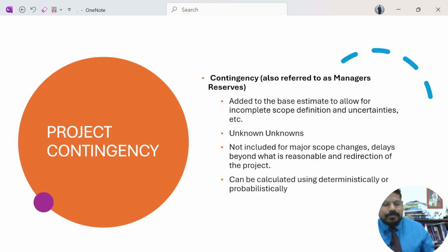Which means what this person is going to do is make the budget out of 80 minus 10, which is 70. So person A, as a project manager, will plan all the project things out of 70 crores and not 80, because 10 is contingency reserve. The 10 will be used only in case of unforeseen circumstances, risk management.